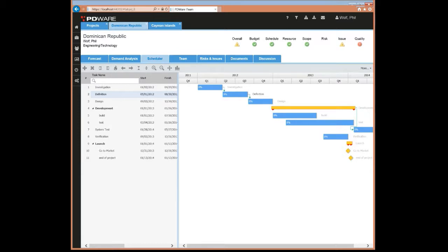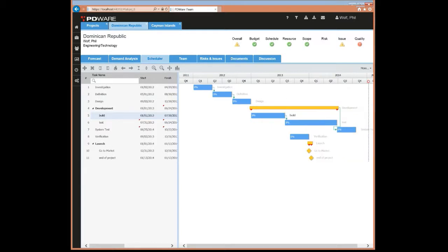We're carrying over the same functionality that we had before, which is that everything saves automatically. As you make those changes, it's a live feed into the system backend, and it saves all your changes, and they become available for everybody to see as soon as you make them, making the application very dynamic. We still have the same functionality if you want to create dependencies between two tasks, by dragging and dropping. While you do that, you'll notice that the pop-up stays, which before would disappear after a few seconds. Then when you release, it creates the dependency.